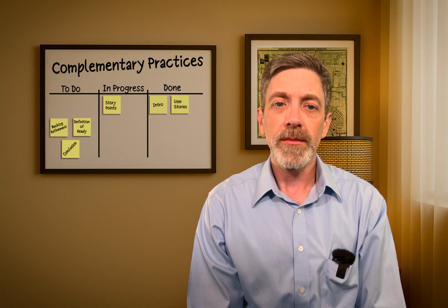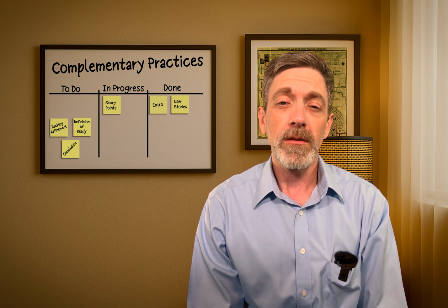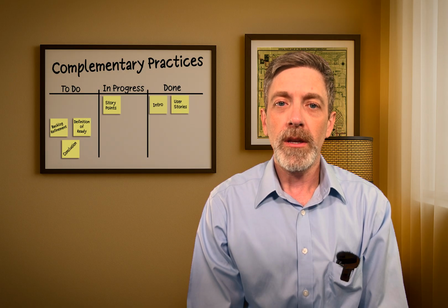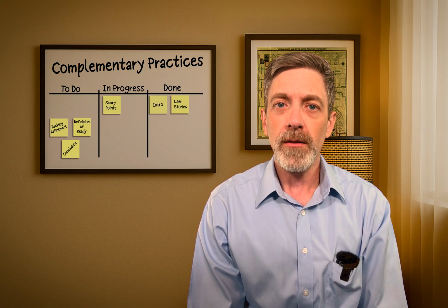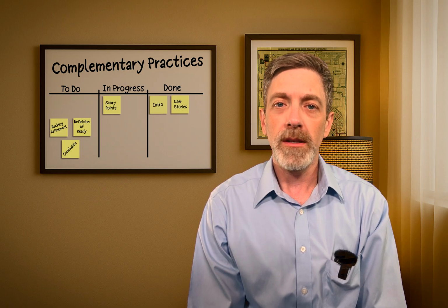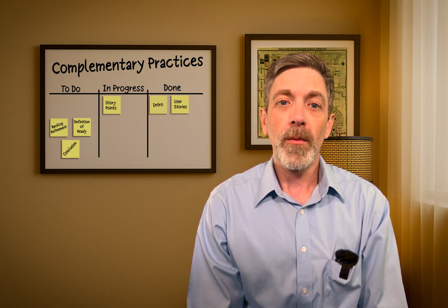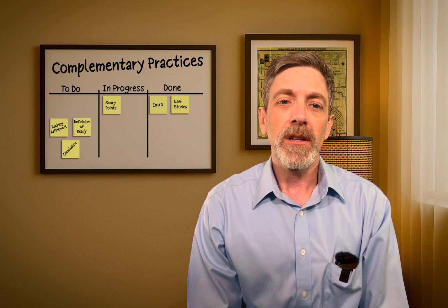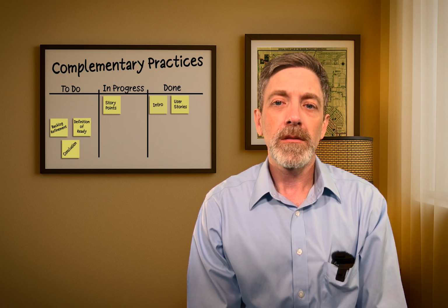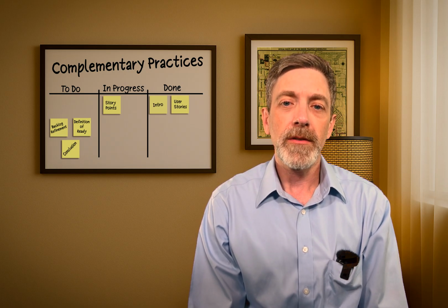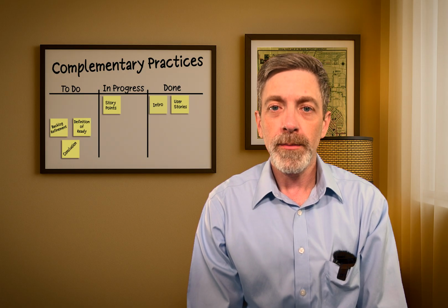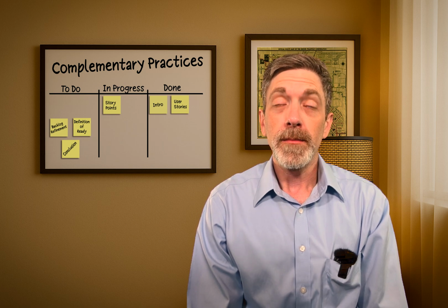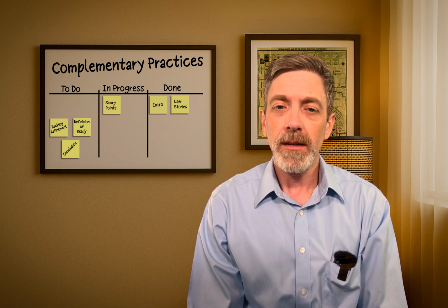There are a few problems with that approach. Surface level, we don't allocate 40 hours a week to our developers typically. We use 6-hour days, so 30 hours, and then that 10 hours remainder is meetings and interruption. But one of the other problems with using time estimates is that different developers might have different skill levels. And so a task that takes a senior developer 1 day may take a junior developer 3 days. This makes projecting completion dates and capacity difficult and time consuming.